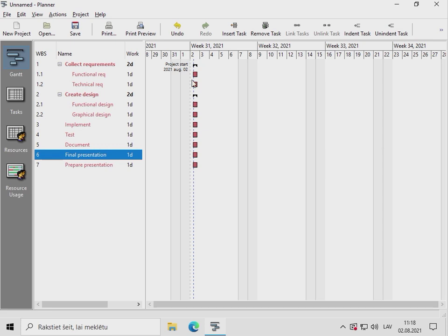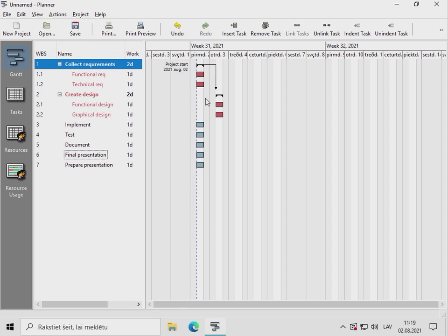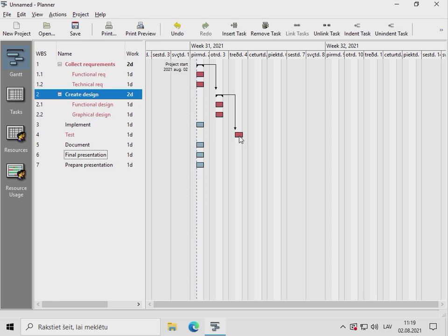And so then you can mention these tasks and subtasks, and by default each task is one working day. You may change it to something else, and then you add dependencies. For example, for a strict waterfall model, that would be something like this.